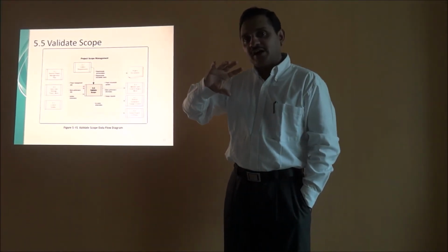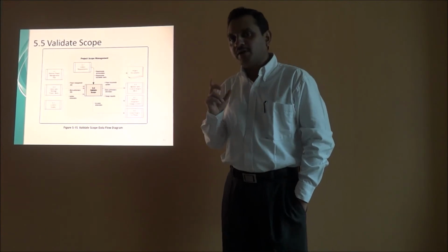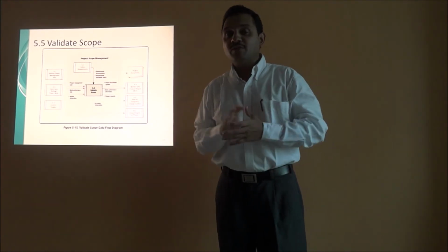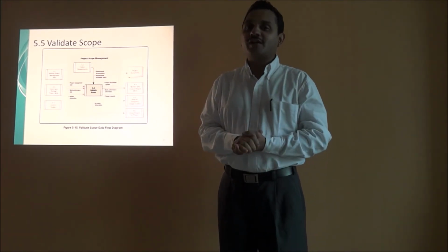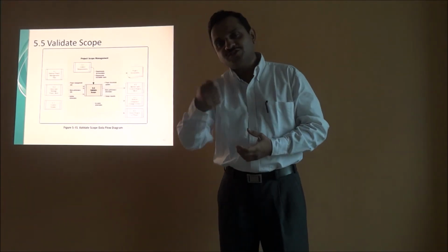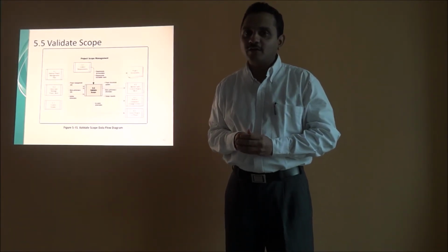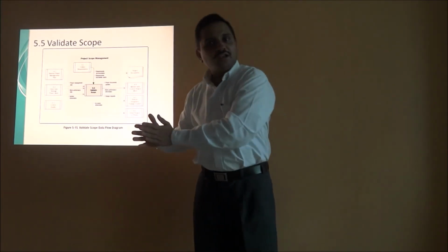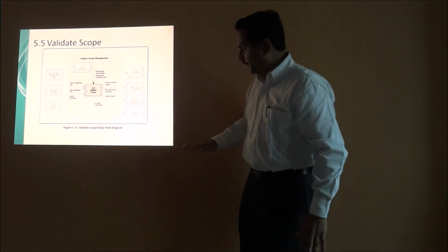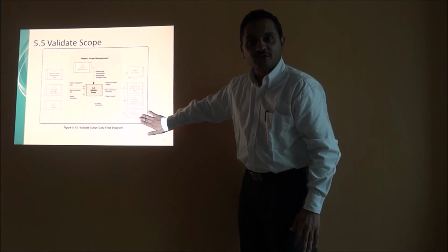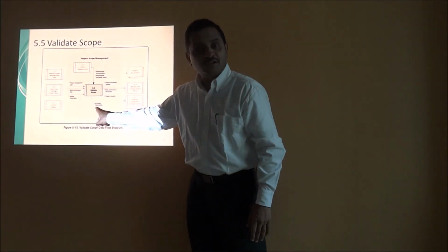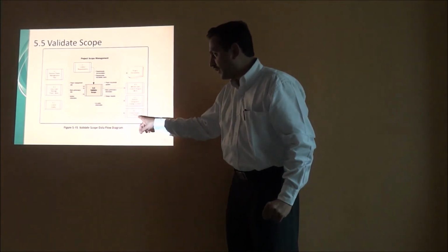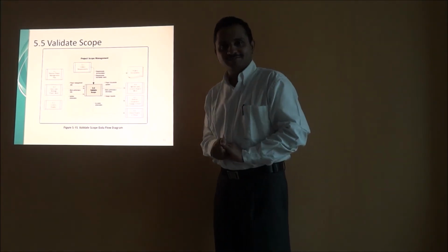Now let's understand that after this change request was implemented, what happened? Mrs. D'Souza came in the second time. She saw that the Jaguar fittings were fitted, and at that time she said, I am okay to accept it, and therefore let me pay you the check and let me take the keys of the flat. So essentially the deal of her buying the flat and finally taking the possession after making the entire payment was a project closure or a phase closure here. Therefore, when she accepted the deliverables, taking the handover of the keys, the accepted deliverable goes as an input to close project or phase.